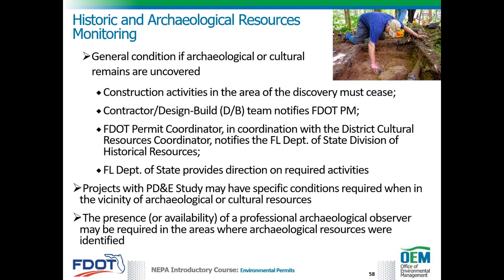FDOT's Construction Project Administrator will inform the contractor of these requirements. In addition, the presence of a professional archaeological observer may be required when construction is ongoing in the areas where archaeological resources were identified previously.